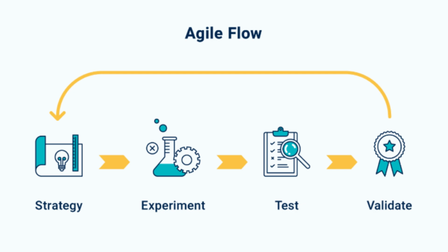We have the sprint review, which is a time to demo any progress to each other and stakeholders, as well as cover any learnings. The sprint retrospective, a time for the team to look back at the prior sprints and discuss what went well, what didn't, and how you can grow from those things. And we have the backlog grooming and the daily stand up.